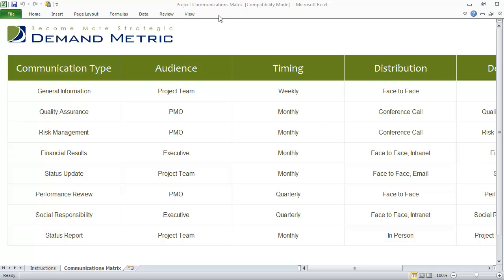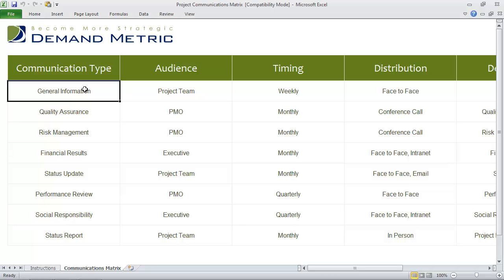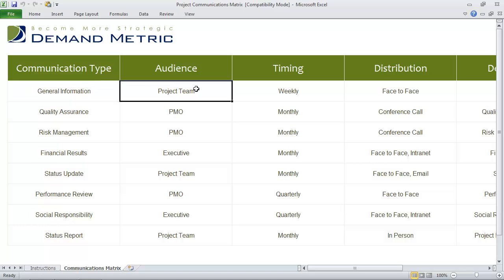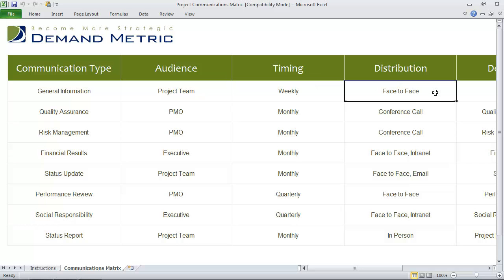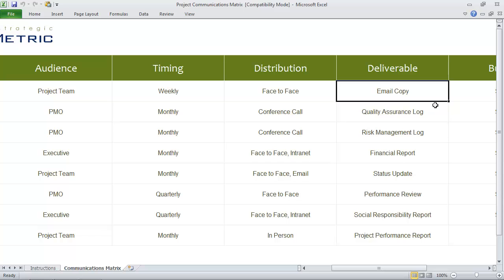That's why we've created the Project Communications Matrix. It's a simple Excel tool that allows you to identify the communication type, the audience — so who the communication is going to — the timing or frequency, and the distribution, so how this information is going to be distributed.